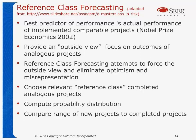Reference class forecasting came out of this Nobel Prize work, and they suggested that the best predictor of performance is actual performance of implemented comparable projects — that provides an outside view. If you're going to build a new system, look at what happened in similar systems built before. Reference class forecasting attempts to force the outside view and eliminate the optimism: choose reference class or analogous completed projects, compute the probability distribution of those, and then compare the range of the new project's estimates to the completed projects.